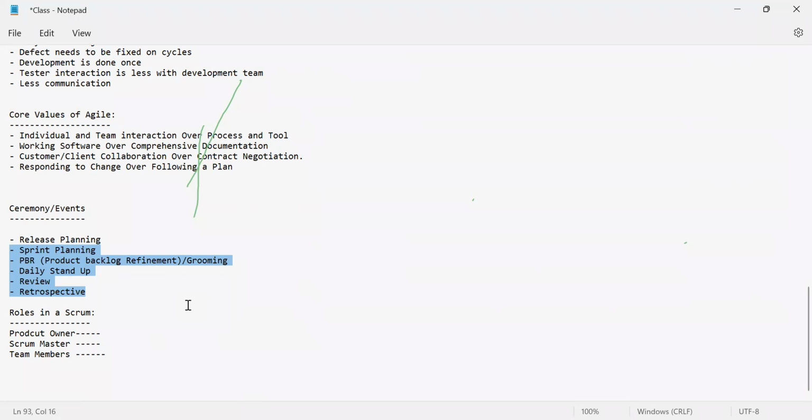The capacity that we are spending on meetings is removed from the actual capacity, and only then the stories or the functionality are picked up by the team to work upon. Once any story is committed, it should be delivered. After 2 weeks, it should be in production. So that's the reason we plan it properly in our sprint planning.